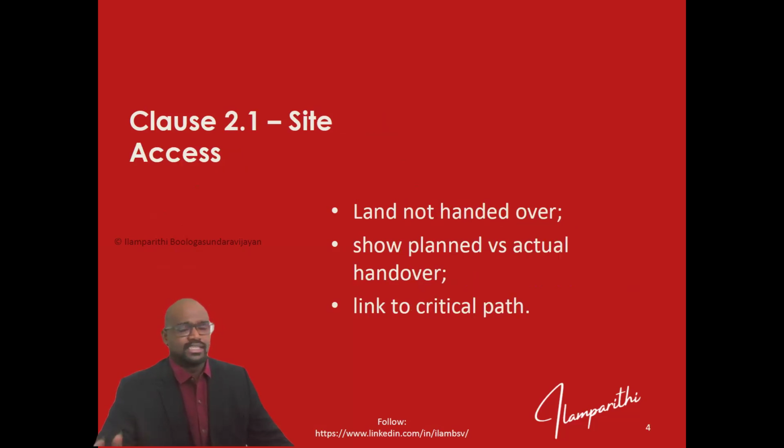Clause 2.1, site access. It is one of the very commonly found delays, delay in providing site access. So land is not handed over. The contractor should prove what was the planned site access and what was the actual site access in terms of days and in terms of areas or geography, and link that to the critical path. If it is not affecting the critical path, then it's not the delay.